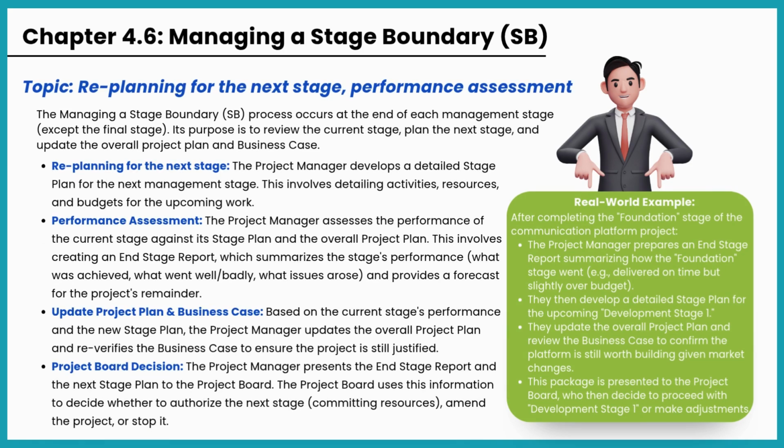Managing a stage boundary is your project's formal pause and review. At the end of each major chunk of work, you assess the current stage's performance, update your overall project outlook, and crucially, you plan out the next stage in detail. This information then goes to the project board for their critical go, no-go decision. It's about deliberate, informed progression.